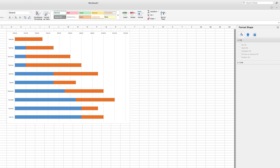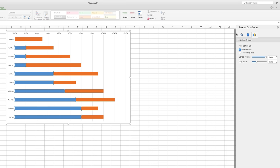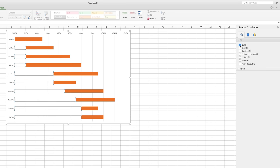Now, we're pretty close but there's still a couple things left to make this look like a real Gantt chart. First, let's get rid of the blue bars that precede our task dates. Click on one of the blue bars to select all of them, then go over to the Paint Bucket. Expand the Fill section and select No Fill. Now it looks like a Gantt chart, though not a very nice looking one.